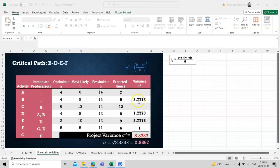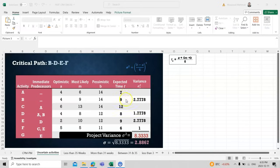The formula for variance is sigma squared = ((b − a) / 6) squared. We find this for each task on the critical path — B, D, E, and F — and then add them all together, because these are task-level variances and we need the project-level variance.